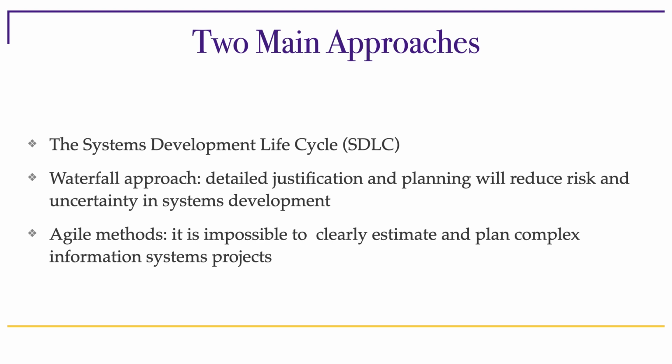In other words, it is impossible early on at the beginning of the project to establish and analyze and identify the requirements for the system in a way that enables then the team to lock them in and go develop. Basically, there's not enough information to do so.